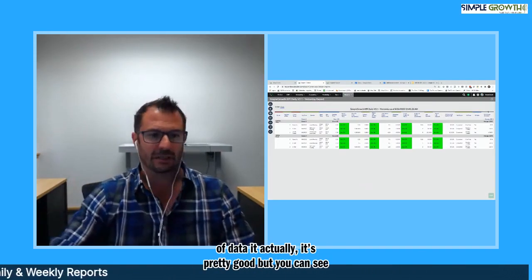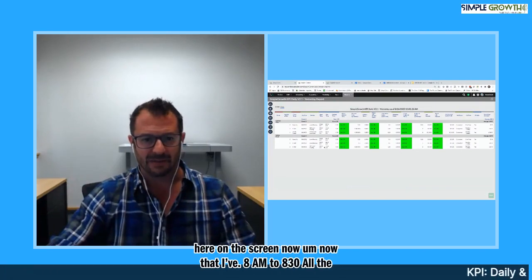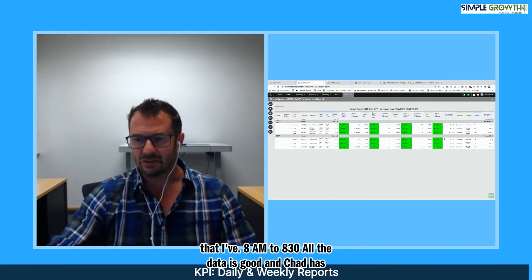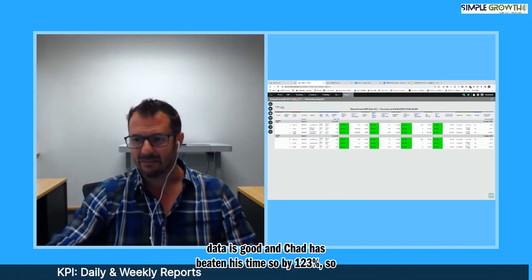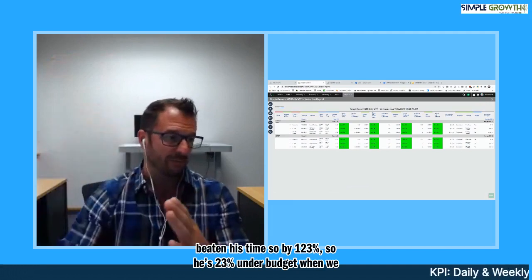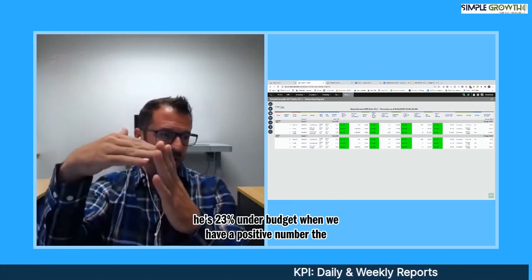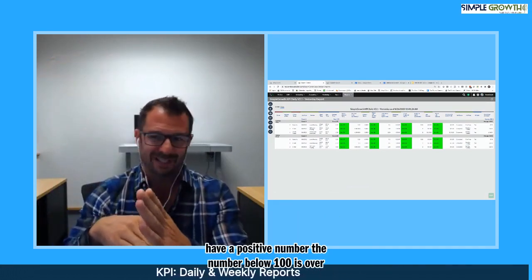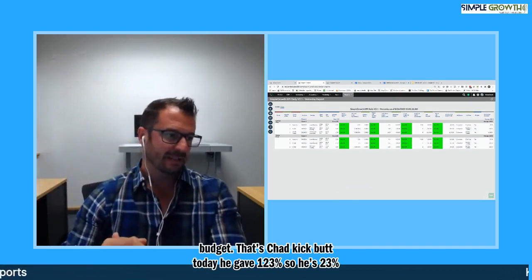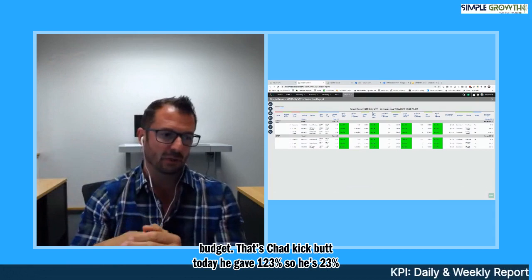But you can see here on the screen now, now that I've updated 8 a.m. to 8:30, all the data is good. And Chad has beaten his time, so by 123%. So he's 23% under budget. When we have a positive number, the number below 100 is over budget. And that's Chad kicked butt today. He gave 123%. So he's 23% under budget with a quality control.